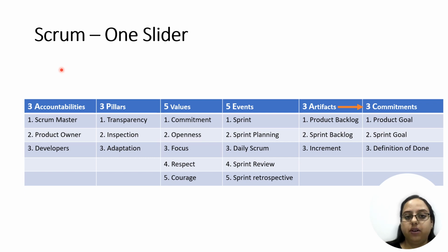The reason for this recommendation is that if the size of the Scrum team goes beyond 10, then it becomes very difficult to have effective collaboration and communication in place, because the communication channels will increase a lot, and then it will be difficult to maintain a close coordination within the team. Hence, it is advisable that you do not have a scrum team whose size is beyond 10 members.